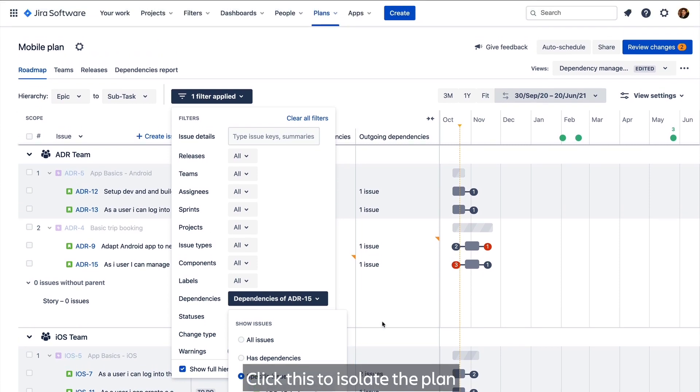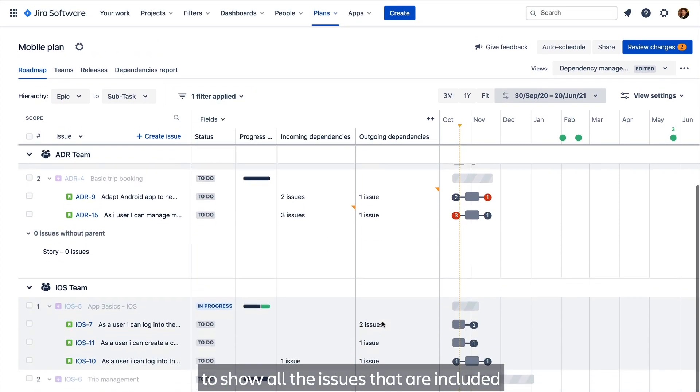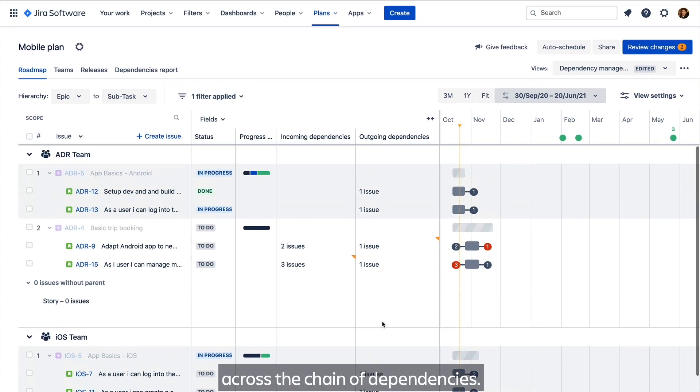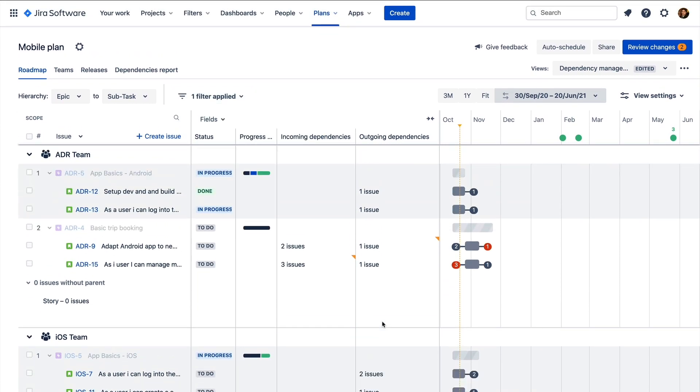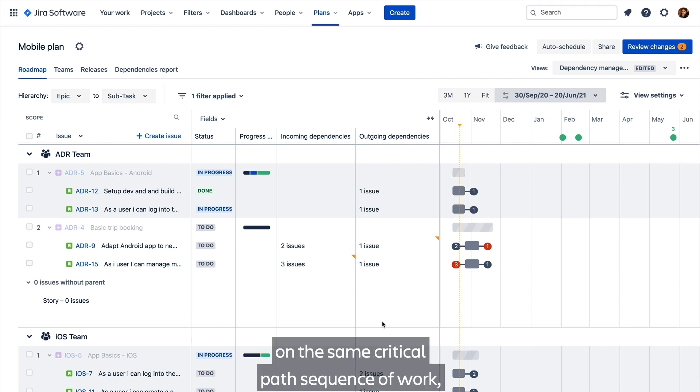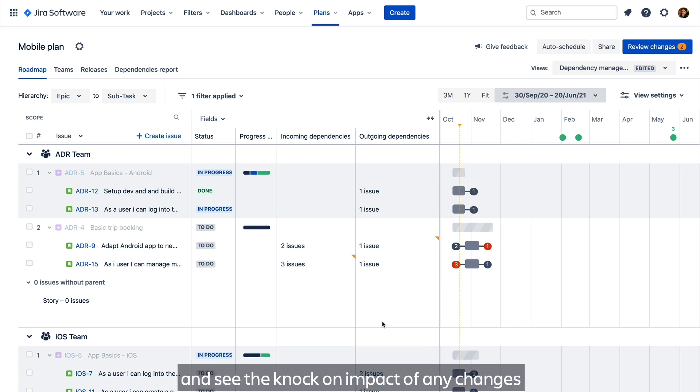Click this to isolate the plan to show all issues that are included across the chain of dependencies. It allows you to understand other related issues on the same critical path sequence of work and see the knock-on impact of any changes you make in the chain.